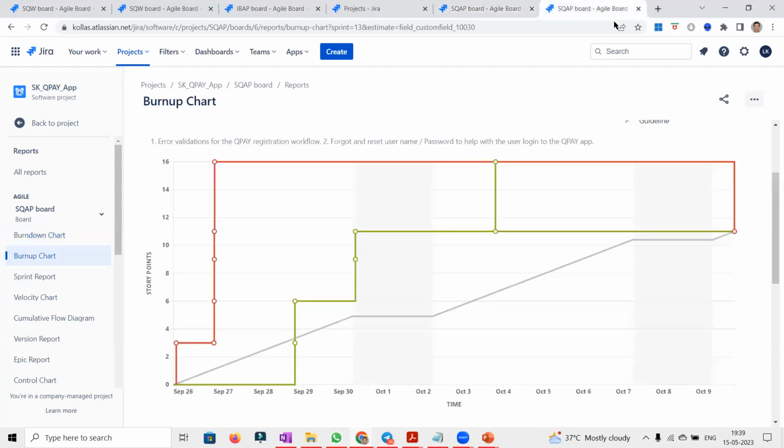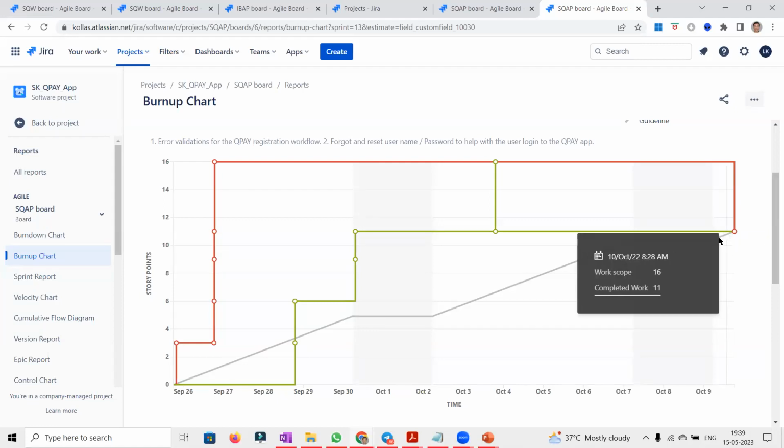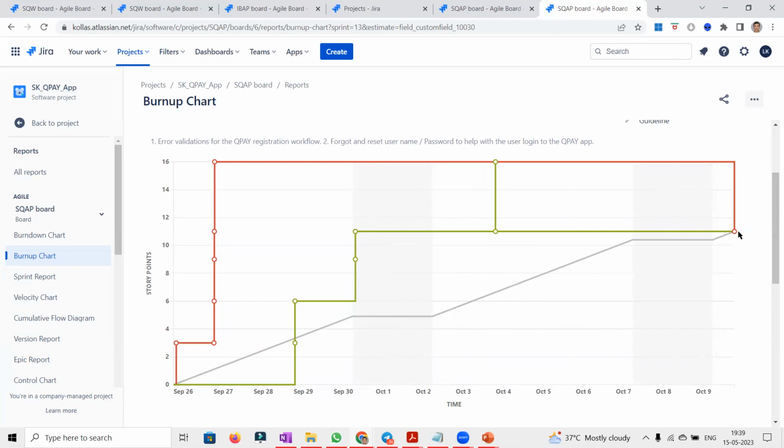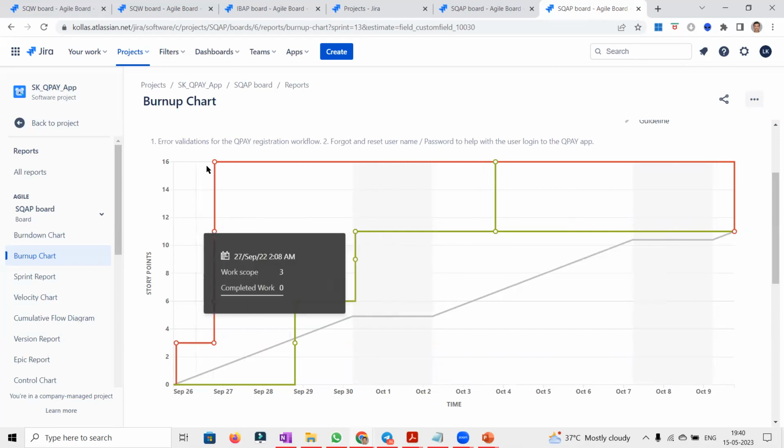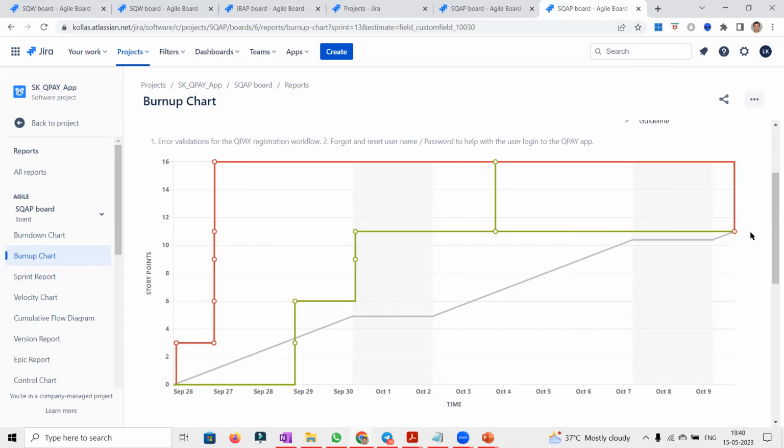But for the same team, for the same sprint, the burn up chart reflects the current situation, current scope, current timelines. And the ideal guideline is showing till the actual completion of the sprint. The guideline is not stopping on October 3rd. It is updating itself automatically till the actual completion of the sprint. Plus, the scope change as well, everything is reflecting clearly in the burn-up chart.